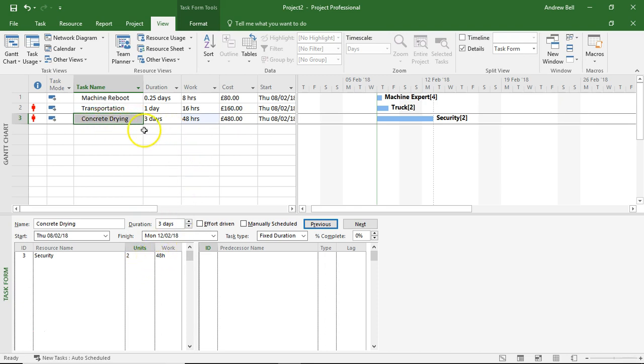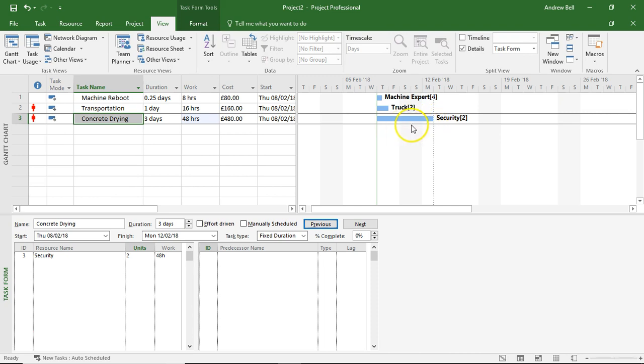But the main issue with my concrete drying is I've said it takes three days and Microsoft Project says, well, that's Thursday and Friday and Monday. So it's ignored - it's taken into account the non-working time of Saturday and Sunday.